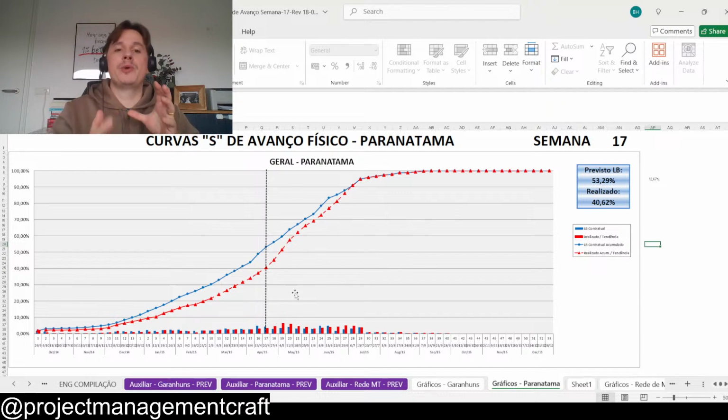So every week there was a check of where we were with the progress, and there was a decision: should we work or should we not work? Does it make sense to work? Is this task critical? Can it be done in a different way? Of course, there were all types of solutions, and you can look for engineering solutions. You can put additional machinery there to try to recover.